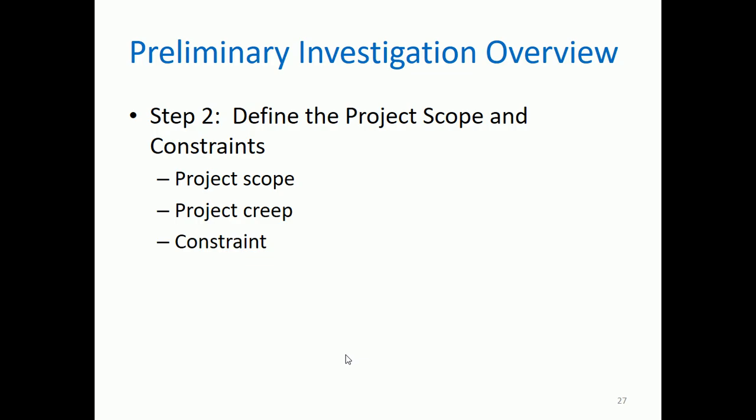And then project creep. What is the meaning of project creep? Project creep means, for example, the management wants to add features to the information system that you have proposed. Of course, if you're going to have additional features for that information system, automatically, it will affect the cost and it will also affect the schedule.